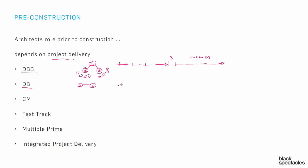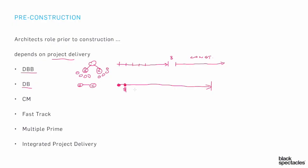In terms of scheduling, with design-build you hire a design-builder and the dollar amount is agreed upon fairly early. The rest of the design and construction phase is then all internal discussion, because the program and the dollar amount have been established very early. In design-bid-build, there's a long period to work out the program and make sure design and program make sense together. In design-build, all of that happens early and the rest occurs internally, giving the architect a very different set of responsibilities.